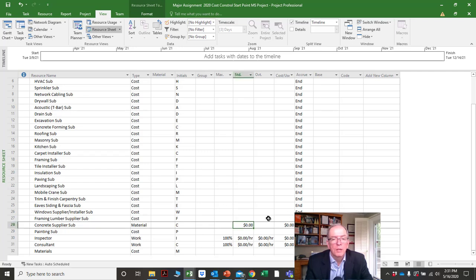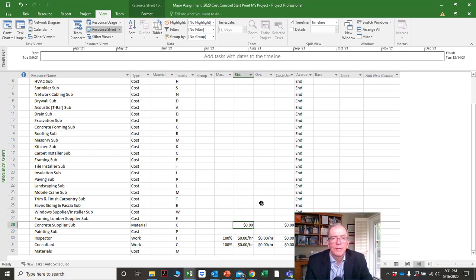If you wanted to measure things like cubic meters of concrete or square feet of ceramic tile — anything measured by area, cubic feet, cubic meters, or cubic yards — you could put that in as a material resource.